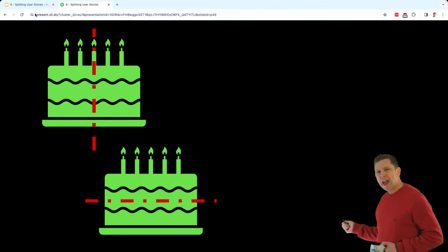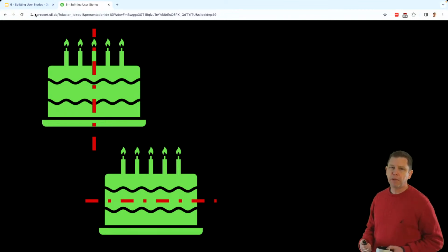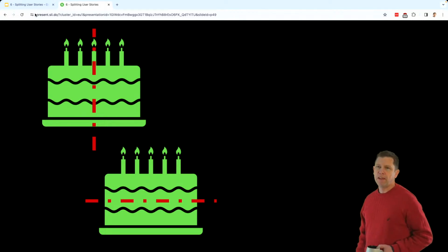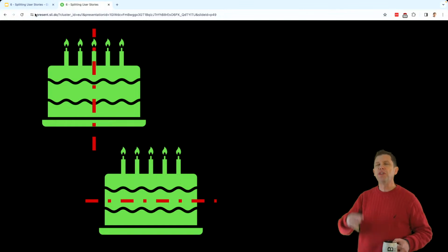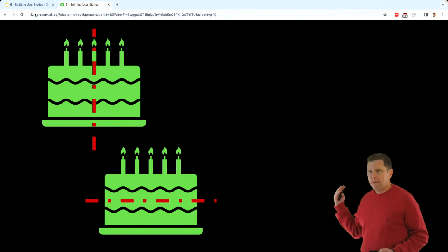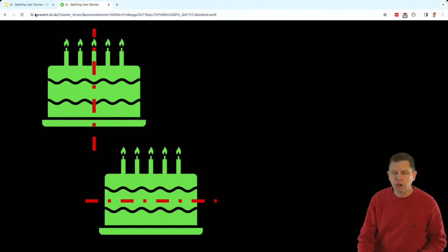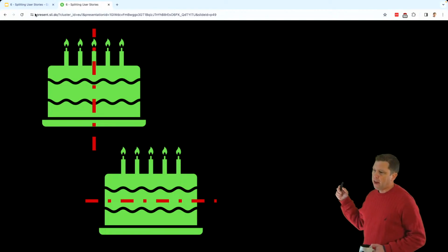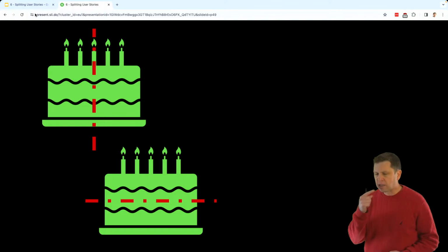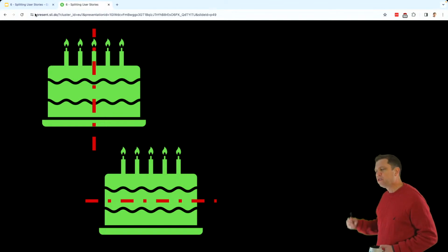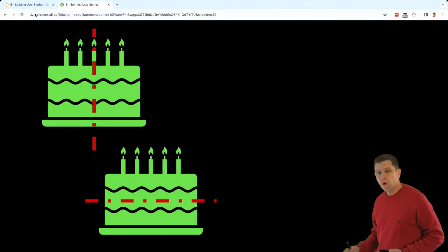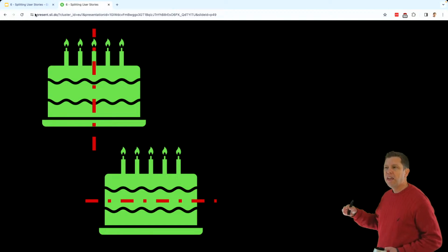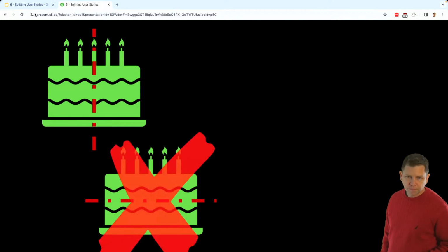But that's not how the customer is thinking about the application. They're thinking of it as a slice all the way through. Sure, they know there's a database somewhere down by the bottom, and there's business logic and stuff, but they think of, oh, this is the piece of the application that lets me enter the fact that I wrote a check, if it's an accounting application. Or this is the piece of the application that lets me add a contact to my email list. They're thinking in terms of what they can actually do. So the more we can align our development work and our stories with the way that the customer thinks about the application, the easier it is to actually deliver things in units that have meaning and value to the customer.